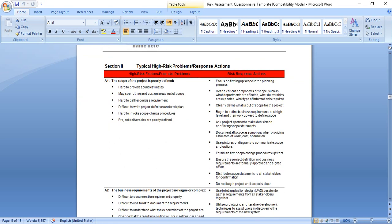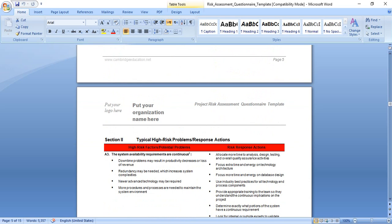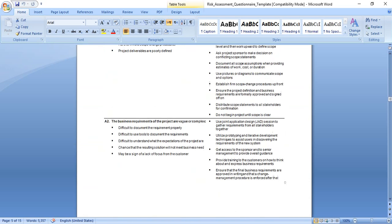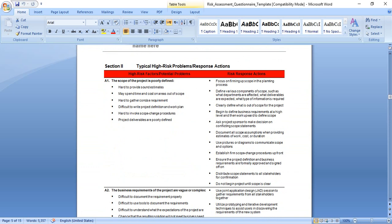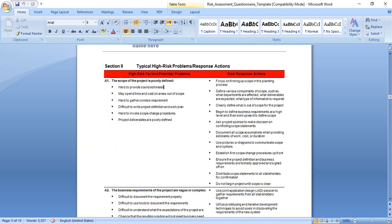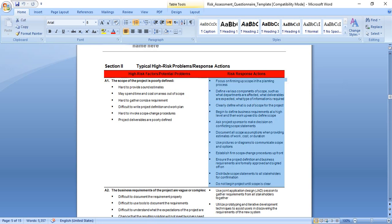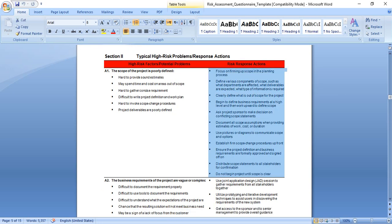Let's take an example of how to fill the form for typical high risk problem responses. For example, the scope of the project is poorly identified. It's hard to provide estimates. Estimates may spend time and cost areas out of scope. Hard to gather consistent requirements. Difficult to write project definition and work plan. Hard to invoke scope change procedures. Project deliverables are poorly defined. The risk response action which we should take: focus on firming up scope in the planning process. Define various components of scope, such as what departments are affected, what deliverables are expected, what type of information. Clearly define what is out of scope.